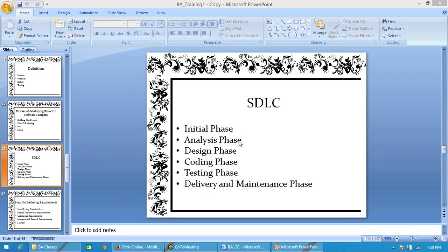And once the technology selection is done, we'll proceed with analyzing each and every requirement. So the requirement analysis process goes on from here. The list of requirements is mentioned in a document, and that is the BRS, and each and every requirement is cross-checked on whether we will be able to develop them successfully without any bugs. And the proof for this particular phase, the analysis phase, is the SRS, Software Requirement Specification Document.